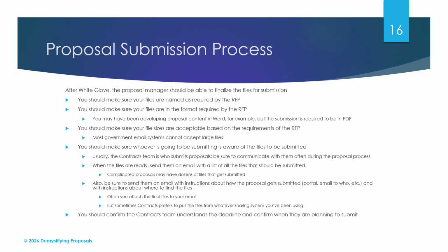After White Glove, the proposal manager should be able to finalize the files for submission. You should make sure your files are named as required by the RFP. You should make sure your files are in the format required by the RFP. You may have been developing your proposal content in Word, for example, but the submission may be required to be in PDF. You should make sure your file sizes are acceptable based on the requirements of the RFP. Most government email systems can't accept large files, so you may need to break up your files into smaller chunks.